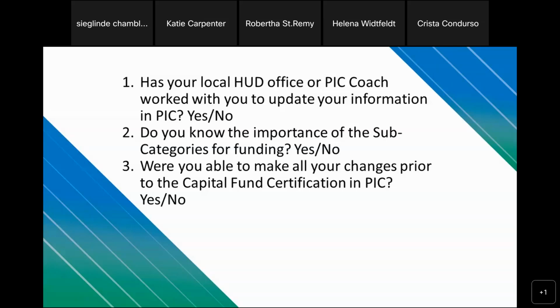What happens if construction work is not done in the 3 years to be vacant HUD approved for undergoing modernization? What we saw in the table, some are eligible to request extension. And let's see real quick what it says on the modernization as far as extension requests. It says 2 years. Yes, if construction is on schedule. So if there are circumstances that prohibit you from meeting the timeline, this is a perfect example.